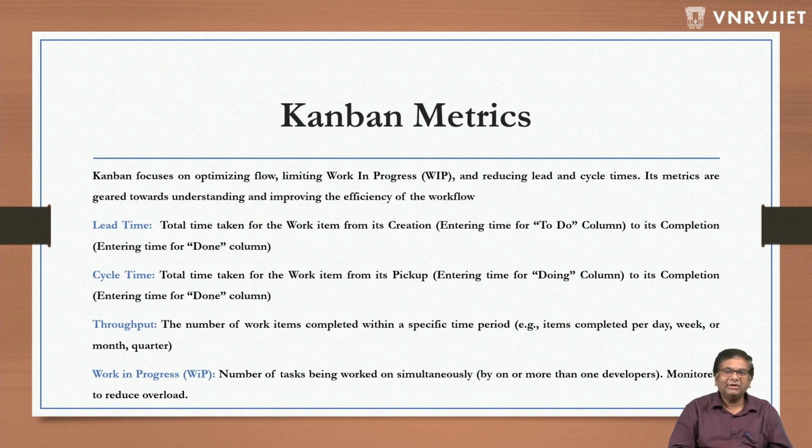Now, what is cycle time? Total time taken for a work item from its pickup to its completion. Now, let's say the ticket was created 1 week ago. Because of its priority, we haven't worked on it.